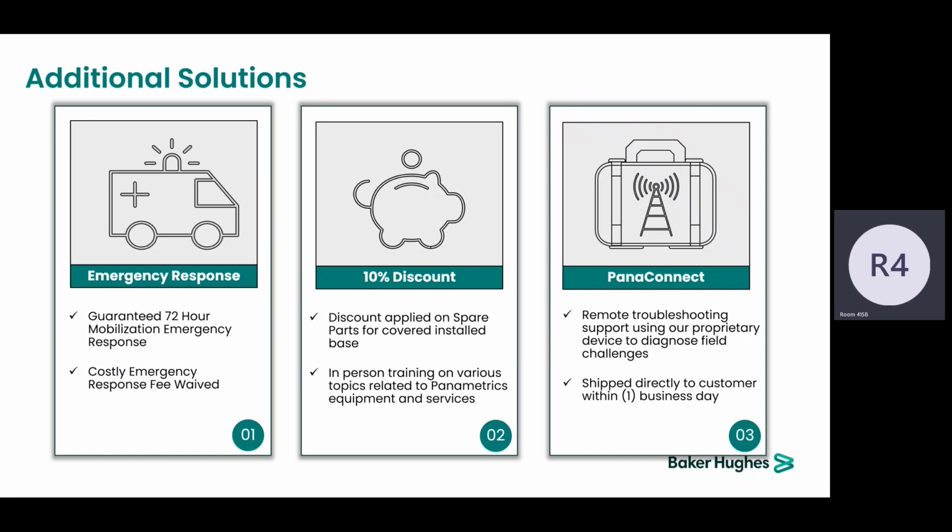And then again, a lot of this stuff we can also package into agreements and contracts with our customers. The ones that are really happy signing contracts are customers that have signed before the inflation, right? We've seen a lot of price increase over the past maybe 24 months now. So customers who have signed prior to that were locked into a certain price, and our agreements run anywhere from 5 to 6 years. So they lock in those prices. No matter the inflation that's going on, the price escalations, those customers who have signed long-term contracts just lock in that price and they don't see any price difference.